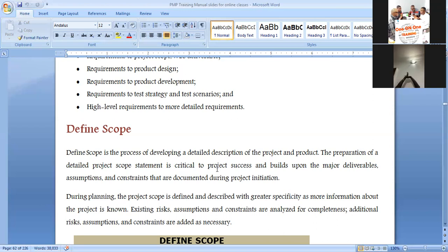But if you dare travel the first 50 meters, you will see the next 50 meters, right? So you take every 50 meters and you plan them in detail, and you move on. So when we are in new territories that we are not familiar with.